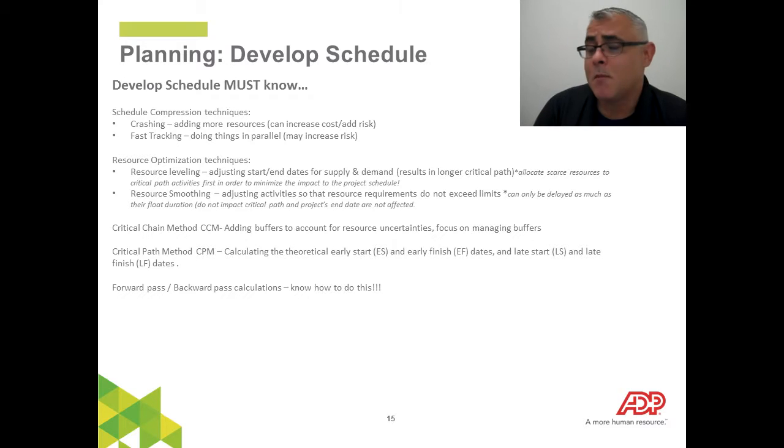And then finally, up on top, schedule compression techniques. Those are extremely important. On the exam, you're not going to have to calculate how to crash resources for activities on your schedule, but you are going to have to understand which activities will give you the most bang for your buck if you happen to crash them. I do have an additional video that I'll be sending out on the night of our discussion for you to follow up and watch, and it'll walk you through how to do crashing. But crashing, really, is applying additional resources to an activity that wasn't originally scheduled, so you didn't originally have those resources scheduled to help you get through that activity. There's a couple of things to remember.